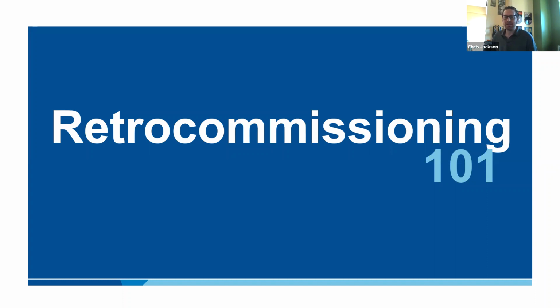As I mentioned, the idea of retro commissioning has been around for a while. You might hear terms like building tune-up or low-hanging fruit. And I'll go into some of the topics a little bit later on the terminology. But in general, you're going to be looking for a savings of 10 to 25% and a payback from 2 to 4 years. It sticks to reprogramming measures, not so much in the capital measures. We can sometimes attach a lighting measure or occupancy sensors, but anything bigger than that isn't really considered retro commissioning.